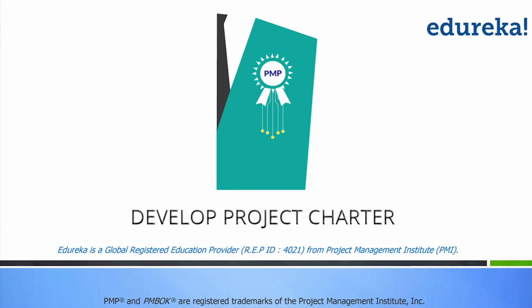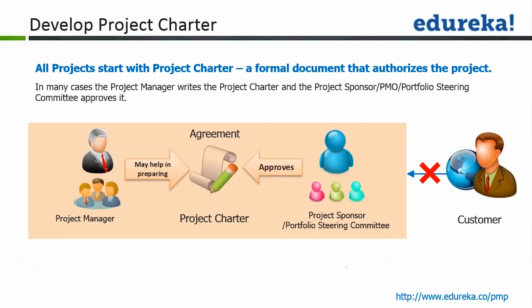Develop project charter. The develop project charter is the very first process of project integration management, and it is also the very first process that you need to carry out in any project. Project charter is a document which will authorize the project manager to utilize the resources of the organization for the project. It will also be an agreement between the senior management and the project team.